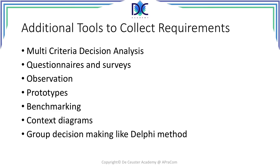We still have multi-criteria decision analysis, which can help us to collect requirements. There are also questionnaires and surveys we can send to people, certainly when you're doing a project for a company which involves a lot of people. We had a project like that within AT&T when we had to move our offices to a new location, and questionnaires and surveys were conducted to find out what solutions the people would prefer. We can also look at observation, make prototypes to see if they work with our requirements, or do benchmarking — comparing ourselves with other companies to set our requirements relative to our competitors.